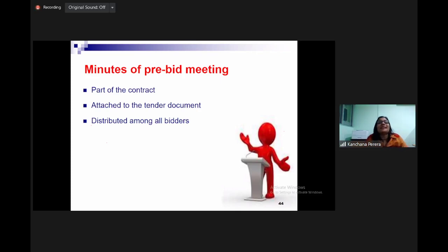Therefore, the pre-bid meeting is very important. That is what I wanted to tell you. You must go to the site and see the difficulty. When we discuss things in the pre-bid meeting, all the things are written and distributed among all the bidders, even those who are not in the pre-bid meeting.